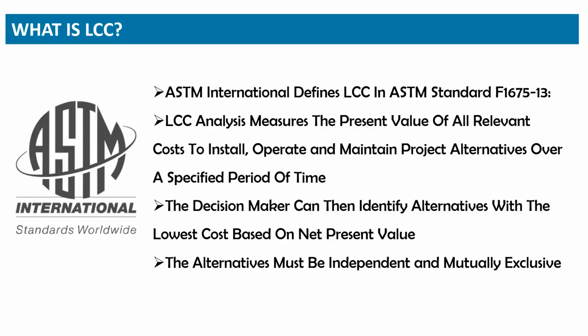That includes, for example, collection system standards. And by the way, it also includes the process of defining how a life cycle analysis should be accomplished so that it captures the present value of all relevant costs for installation, operation, maintenance, for a range of project alternatives over a specified period of time.